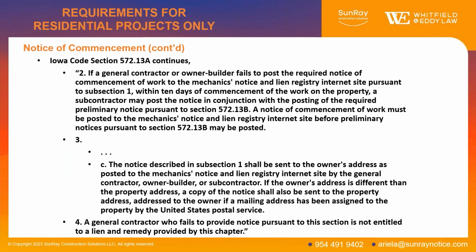Now, if you're a subcontractor, technically there still has to be a notice of commencement. Typically, the general contractor is going to do it, or they lose their lien rights. But what happens if the general doesn't post the notice within the 10 days and you're a subcontractor? Well, you still have to post your notice of commencement. Okay, there has to be just one notice per project. Not for every sub, not for every general, just one notice for the whole project. If the general has not posted it, a subcontractor can. And you can go beyond the 10 days, okay? The subcontractor is not bound by that 10-day requirement.